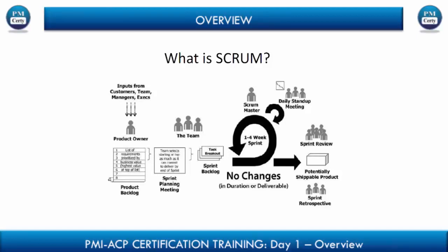Then the product owner says, here's an understanding of this requirement in terms of the domain. These are the kind of features or tasks that you'll need to do to complete this requirement. And then the team looks at it, does some amount of estimation in terms of size and effort and time, and then they again revert to the product owner saying it can be done, can't be done, and the negotiation is typically done between the team and the product owner.